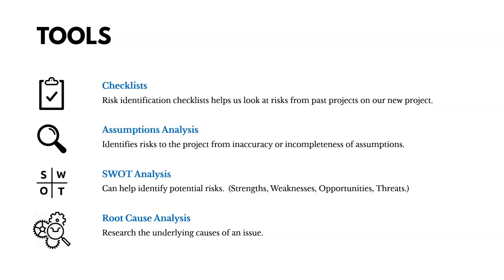Assumptions analysis involves looking at all of your plans and identifying risks based on inaccurate or incomplete assumptions. For example, if you're assuming you can get materials from a Chinese supplier at a certain price, there's a risk that political or other events could make that steel unavailable. You could also use SWOT analysis — examining strengths, weaknesses, opportunities, and threats — to identify both positive opportunities and negative threats. And root cause analysis researches the underlying cause of an issue to identify risks.